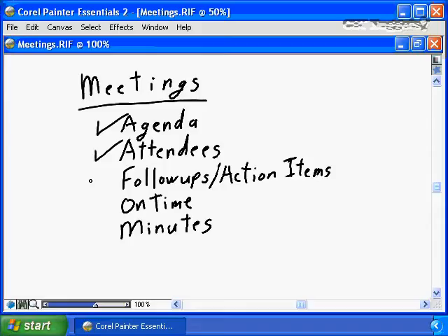As you're going through your meeting, if items come up that cannot be resolved in the meeting, if items come up that need additional information, if items come up that 2 people in the meeting should review and discuss and present a recommendation, generate follow-ups. Generate action items. Do not drag a meeting down while two participants in the meeting have a 10-minute discussion on how to resolve something. Give them an action item. Say, go away, resolve this, and then report back to the meeting attendees what the resolution is going to be, or worst case, let's schedule another meeting to review your recommendation and alert all the remaining attendees of what that recommendation is going to be.